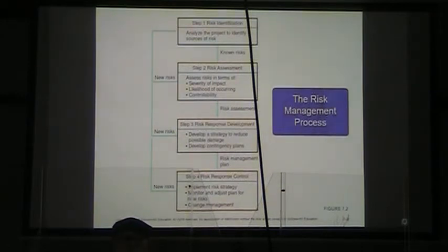And then we would think in terms of controllability. What can we do to make it more likely that developing this new technology is controllable? All right, well, as we go through our risk assessment, we may identify new risks that need to come back up here, go back through the risk identification, and start the process, right?